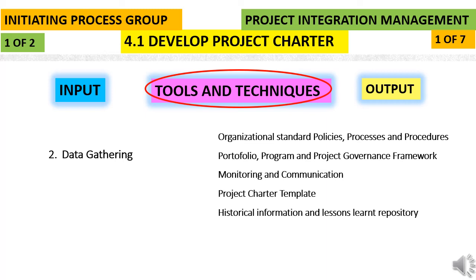So brainstorming is basically a technique used to get a list of ideas in a given period of time. Typically we collect all the people who can contribute to the project and who have got some information, and there'll be a facilitator. The facilitator will ask the team to generate the ideas first, collect them and do the analysis.